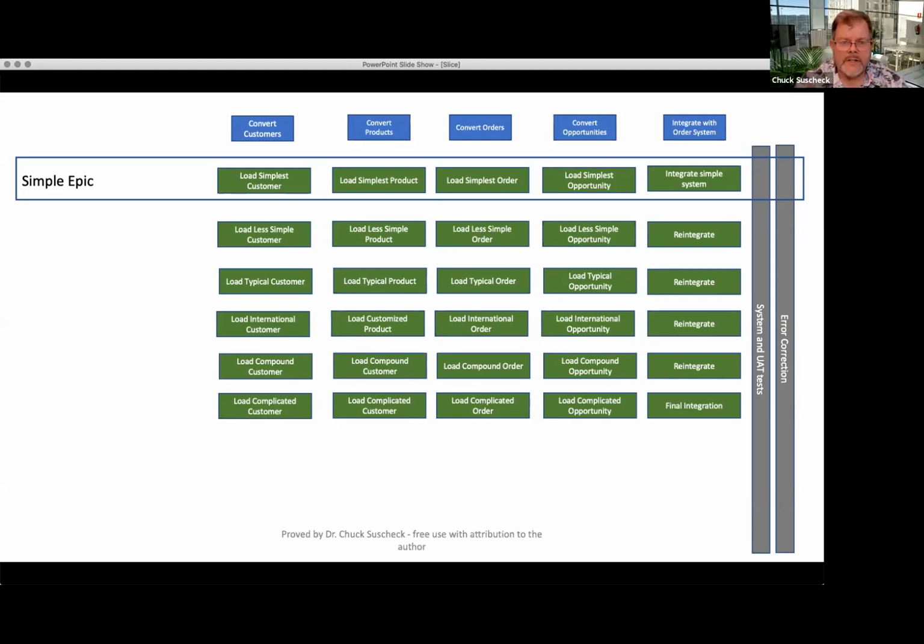And if I could give you another example here too. One company I worked with recently is doing a migration of customer data over to a new system. And they're like, well, we've got to do all our customer migration and then test it. It's like, are there some customers you don't have to migrate? Like customers that are inactive. Or maybe there's some customer out there in Kazakhstan who has a really weird address that is going to really make it hard to migrate them. Maybe you can just process them manually for the time being and still get the product out with those kinds of edge cases for your scenarios.